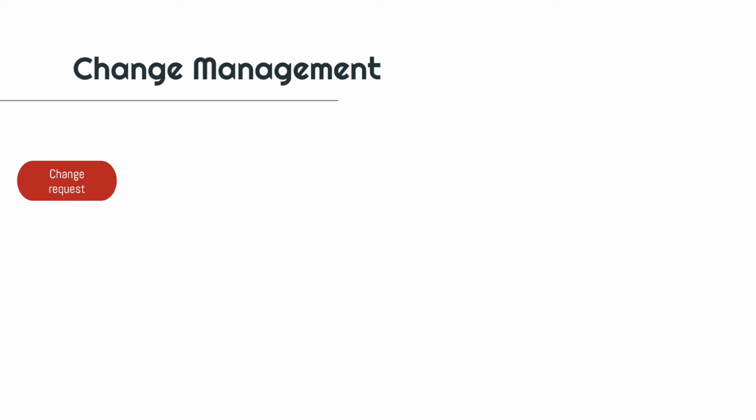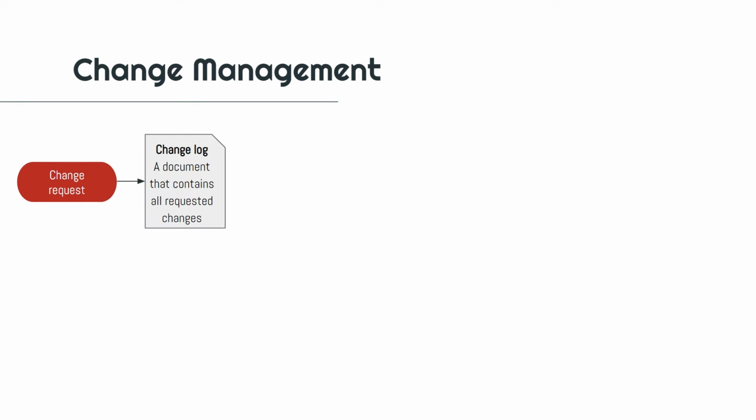The third thing that you need to retain is that when a change request is initiated, it should be logged in the change log. So this is the first step. When a change request is initiated, it should be inserted in the change log. A change log is nothing more than a document that includes all the change requests with their details, their status, etc.